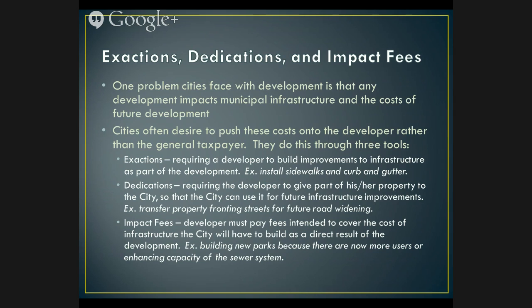So, for example, on Joaquin Village, because it was so huge, my understanding is that the sewer pipes and the water pipes and all of those things had to be replaced and increased in size all the way around it, because the infrastructure wasn't adequate for the number of students that were going to be living there. That would have been determined ahead of time, maybe what that's going to cost the city, and that developer had to pay that amount. Well, generally, go ahead, Jerry. In that specific case, a direct impact to a system adjacent to a project would be an exaction or something like that. For your project, we wouldn't need a 12-inch pipe, we only need an 8-inch pipe. So that's a direct cost of the project. The city would say, you have to increase that pipe size, Mr. Developer, you have to build that yourself. Yeah, he has to pay for it, you do all of that.